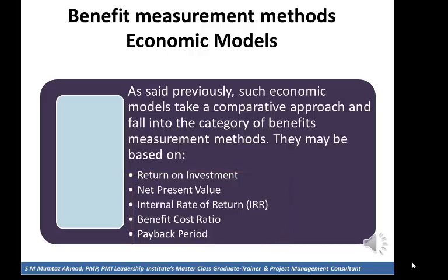The rule for selecting a project based on the first four options will be the bigger the better, while the rule for selecting a project based on payback period will be the shortest duration. We will talk about these terms more when we come to the cost management knowledge area.